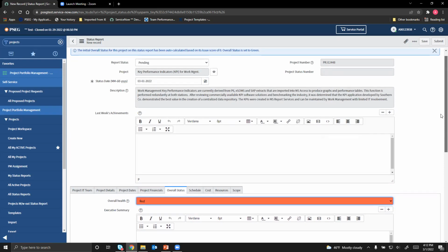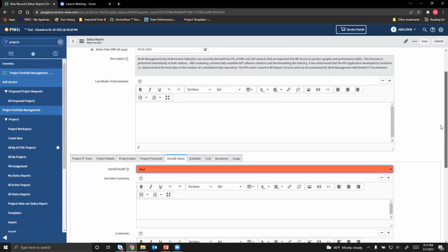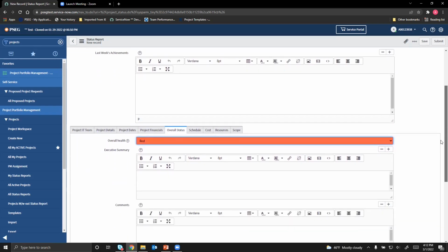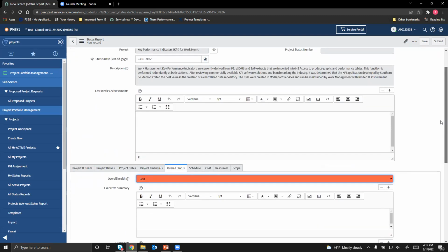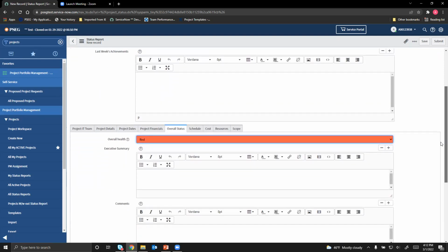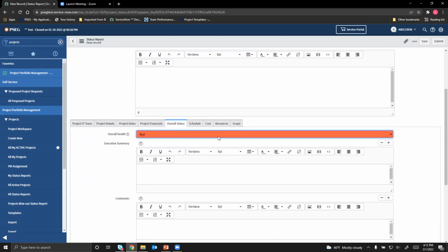Now, with that said, we are designing PTS keeping all these things in mind, and a lot of information will be auto-populated in the PTS form. Even the indicators, at least the overall indicator, will be auto-checked, taking the color. So you don't have to worry that if the individuals are yellow or red, then overall automatically it will turn yellow or red.